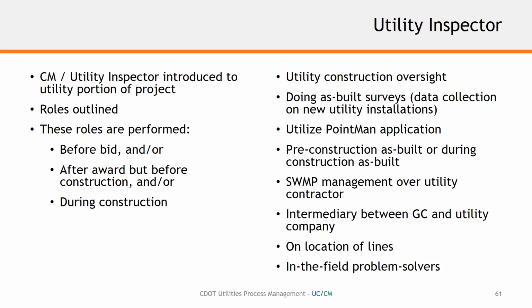So utility inspectors are unique to certain projects. They're not for every project, but for projects that have large utility impact or high risk utilities, it's a really good idea to have construction management specific to utility inspection and construction available. And we've piloted this throughout mostly Region 3 over the past 5 years or so, and have had really strong results with this type of scenario. And so construction management, utility inspector, again, introduced to the utility portion of a project.